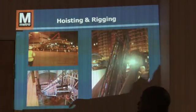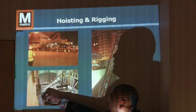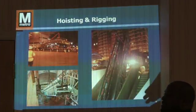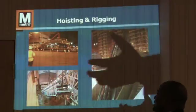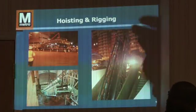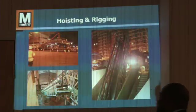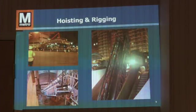I don't know if you can see here, these are the gantries that hoist it and lower it all the way down in place. Now, this is the first phase of this project: the demolition and removal of the escalators. That in itself is a month's worth of time, which allows us to access the wellway itself, and then we would determine the structural integrity of the wellway. As you know, these escalators have been in service for over 30 years. We don't know what we're going to find.